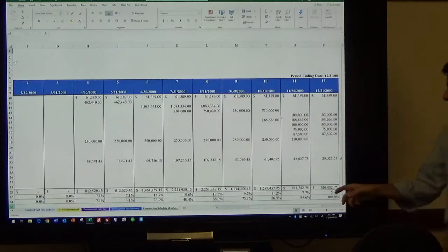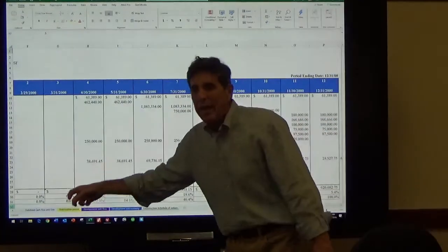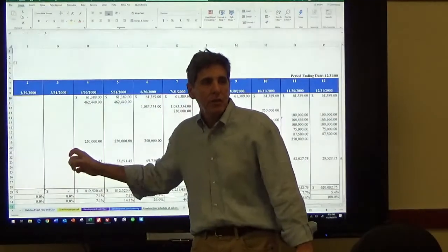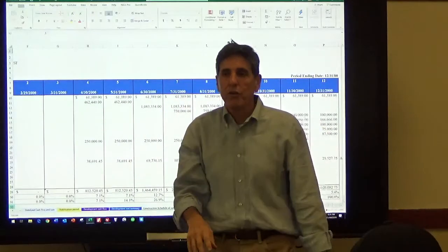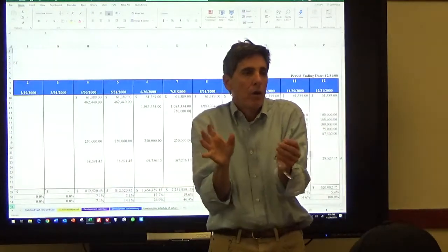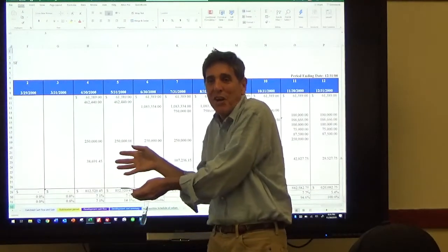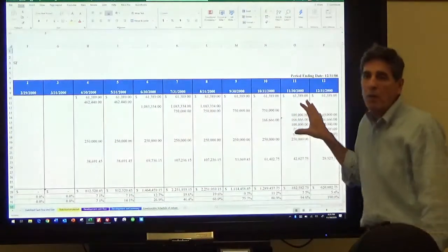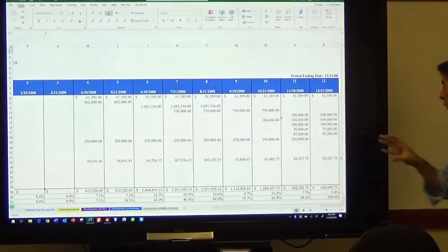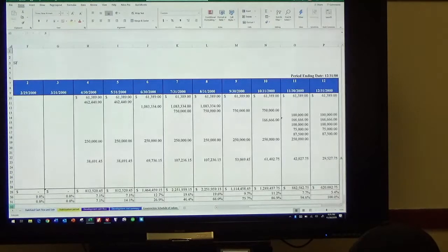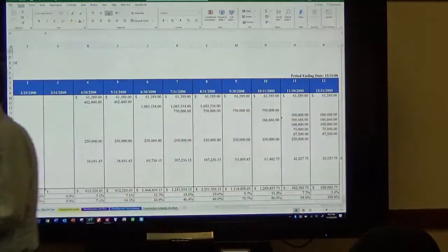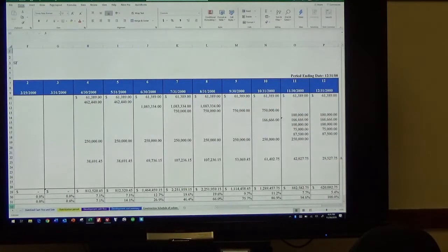Okay? Now you can take these percentages, add your contingency to this, and now you can populate your sources and uses statement. Now you've got 60–70% of your development costs already modeled. And what we want to get to is the equivalent of that purchase price. Okay? So, step number 1, get your schedule of values, get the estimate from the contractor, and map it out.